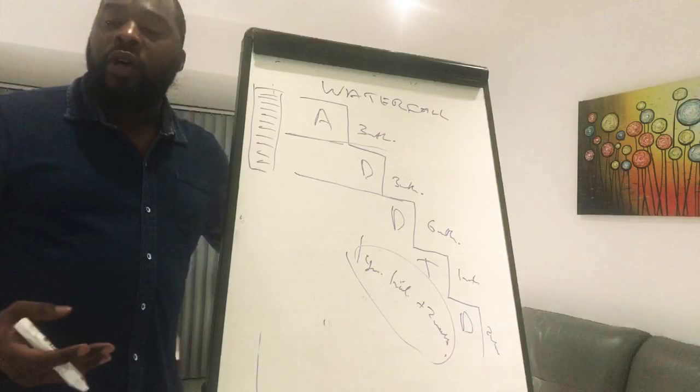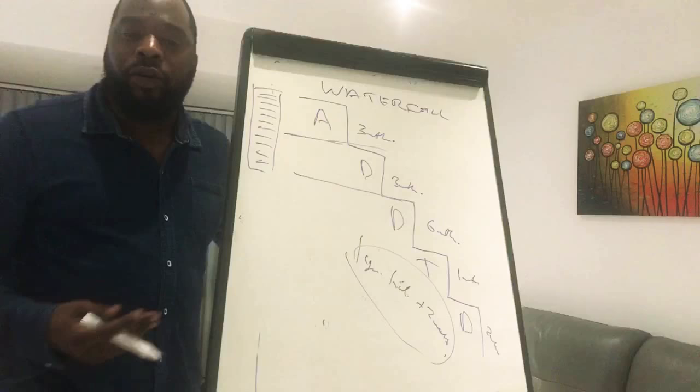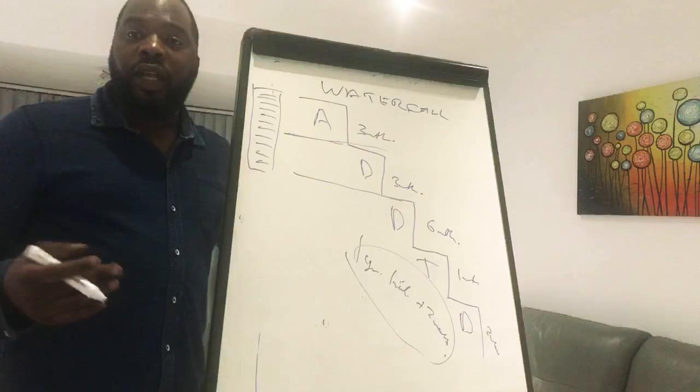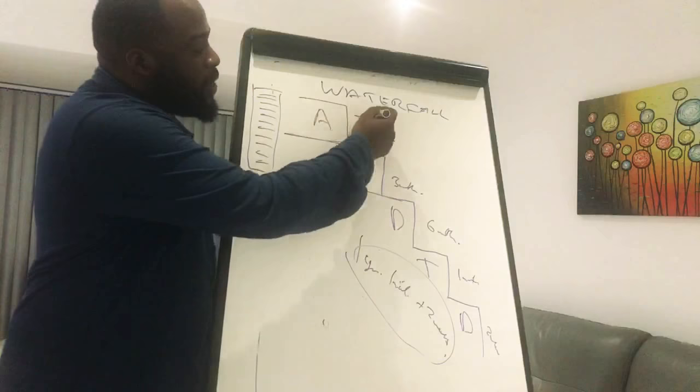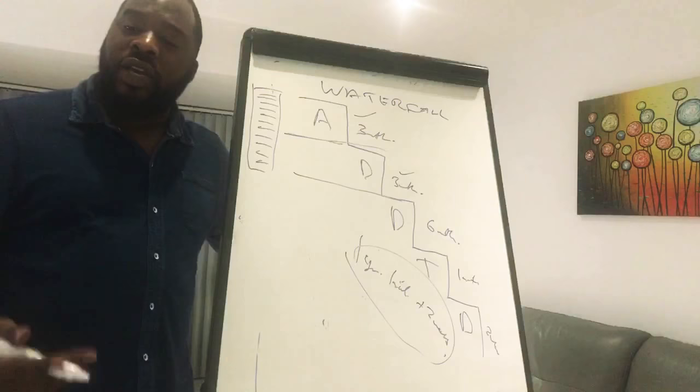The models already exist. The client is just saying, for example, an e-commerce platform, and you're using the Magento platform. The client will say, I want the Magento login, I want the Magento checkout, I want the Magento basket, I want this, I want that. Those models already exist. So you can analyze the requirements, sign it off, hand it over to designers, develop, test, deploy, with very little changes. They're still relevant in today's age, but for models that already are in existence.